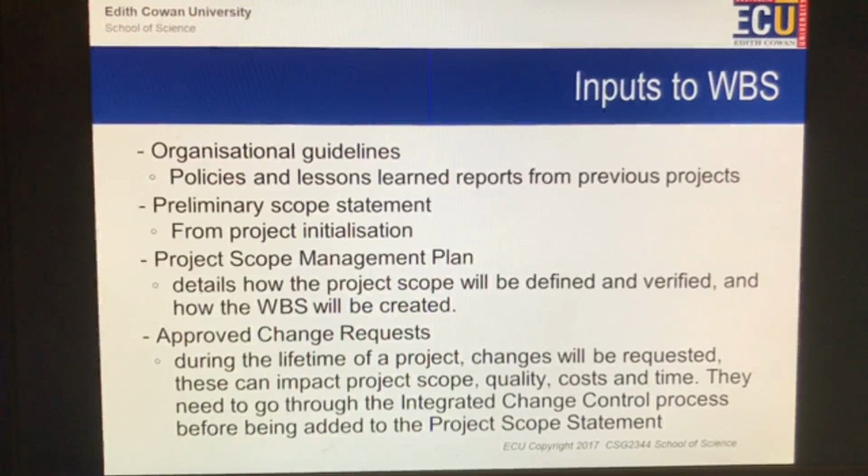So change requests are an important part, and they're important inputs to the work breakdown structure. It's an important point because sometimes people put a work breakdown structure together at the beginning of a project and refuse to add anything to it as the project keeps going.